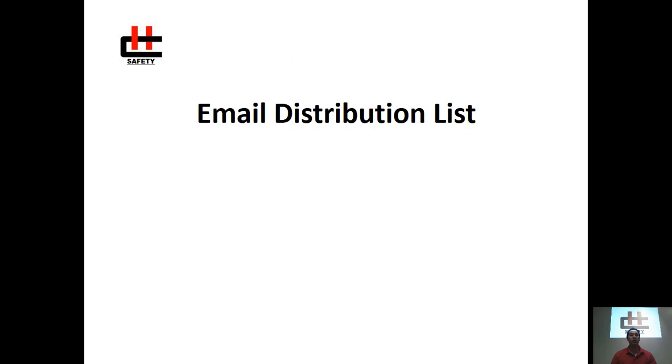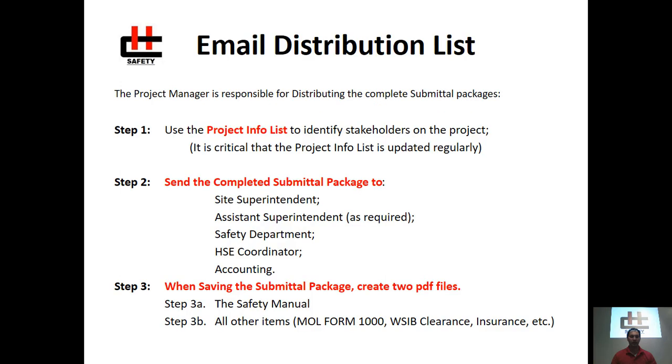Once the contractor submittal package is complete, it's important that we email it to the appropriate parties. The project manager is responsible for distributing the completed submittal package. Step 1. Use the project information list to identify the key stakeholders for the project. It is critical that the project information list is updated regularly.